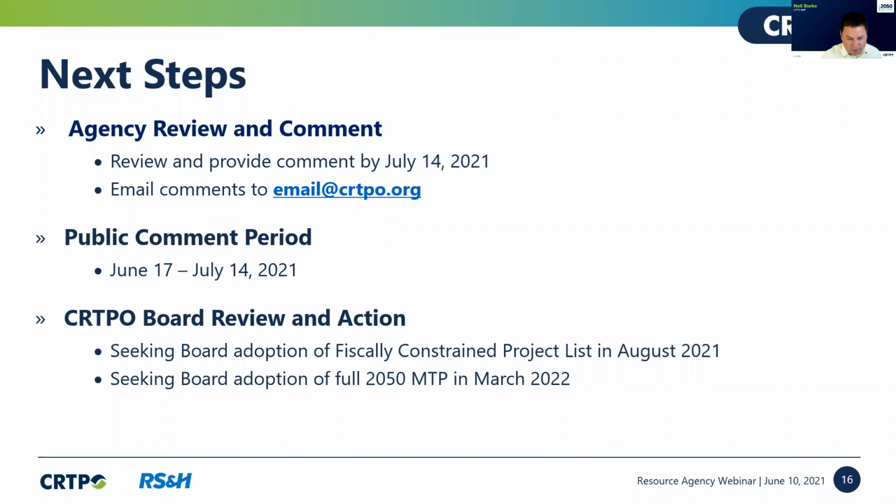My concern is that some of the widening projects might make the road less safe in the end. And I did confirm with the consultants that we did use crash reduction factors. So we're not only looking at the past crashes, but we're looking at the planning level scope of the project and using those crash reduction factors similar to how NCDOT, the SPOT office, uses those in calculating prioritization scores.